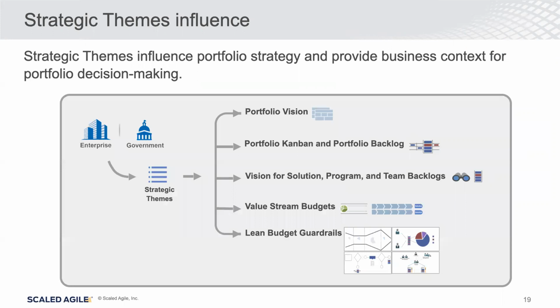Stephen, I have a question. How do they follow up? So they're usually quarterly OKRs. So they set them and for. In our SAFe implementations, these are essentially part of the quarterly planning. Now SAFe calls it program increment planning, PI planning, yes.